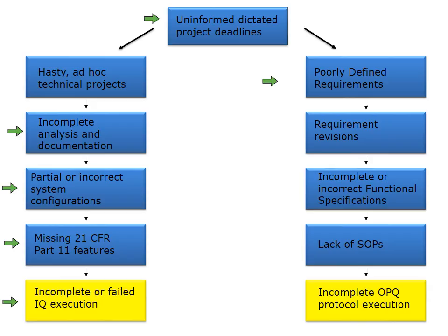These often become afterthoughts. If you have poorly defined requirements and the resulting requirement revisions as the business gets more and more involved, you're going to have functional specifications in the validation side that are incorrect, that have to be continually revised, which directly affects your risk assessment, your OPQ, when you can start actually doing the validation.